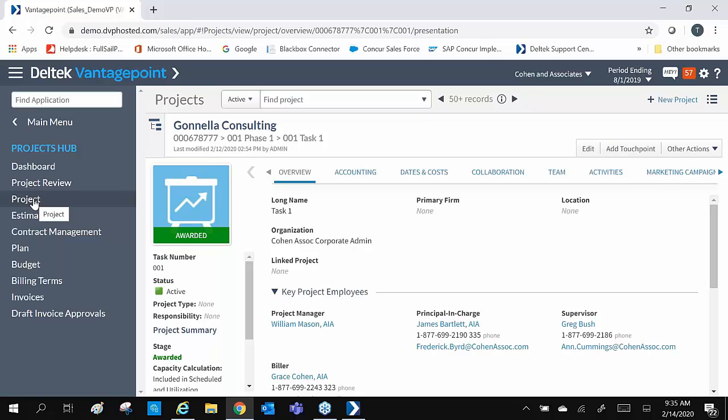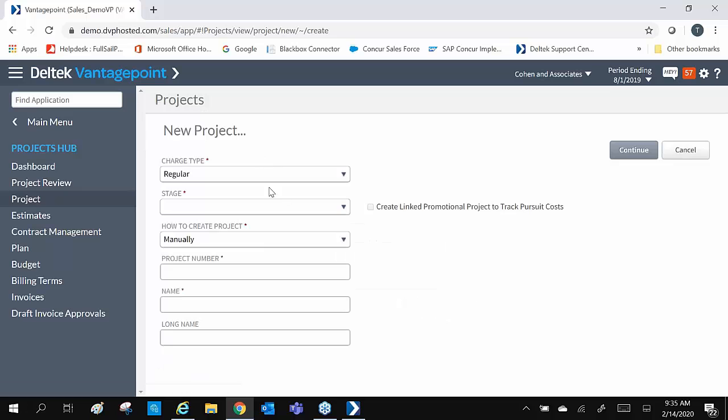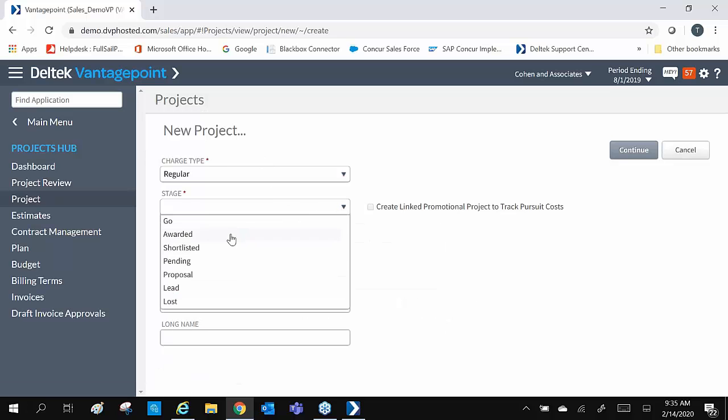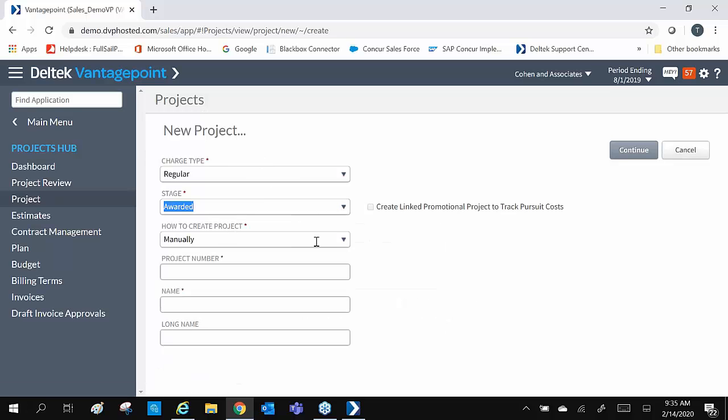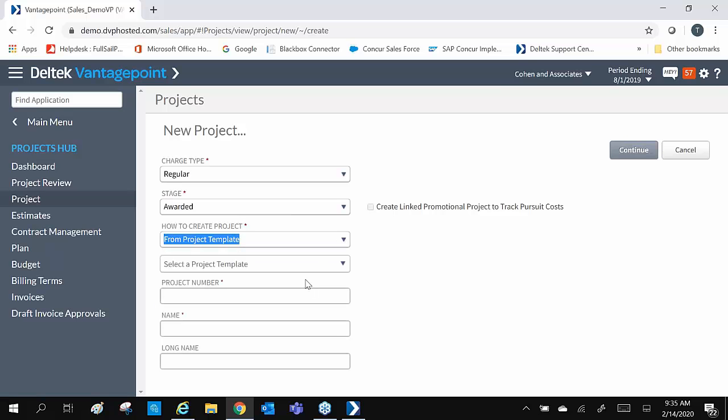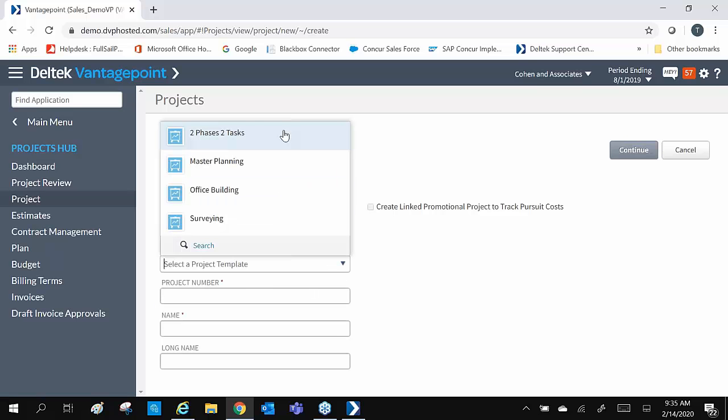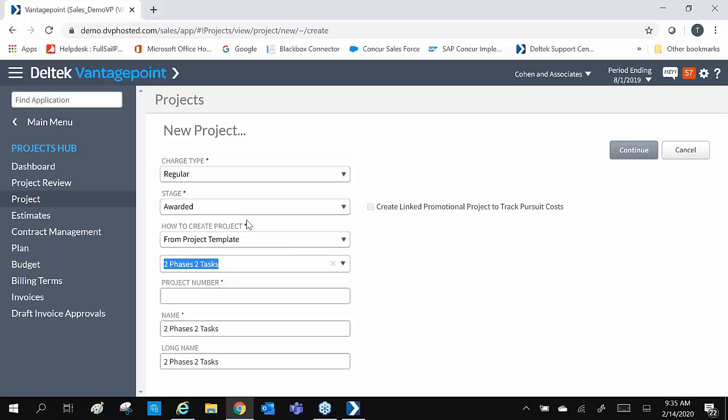We are going to create a new project from a template. In the Project tab, we can click on New Project. Yay, we won the project. So we're going to select Awarded for a Stage, Create from a Template, and select our two-phase, two-tasks template. Give our project a number.